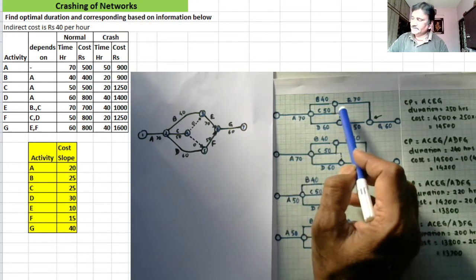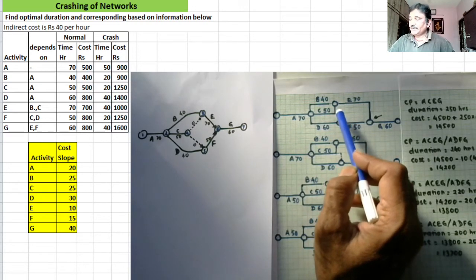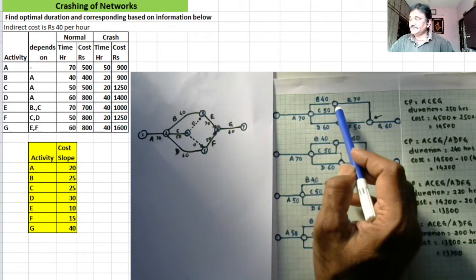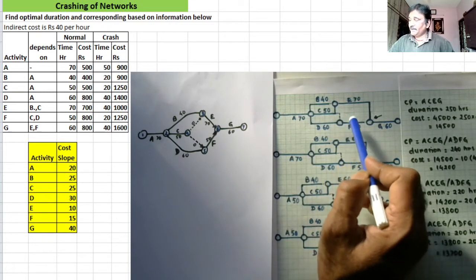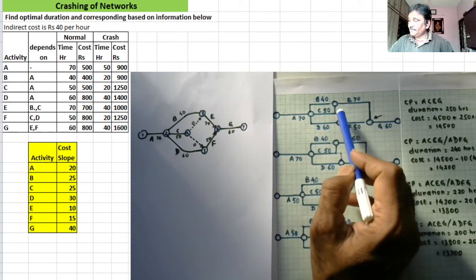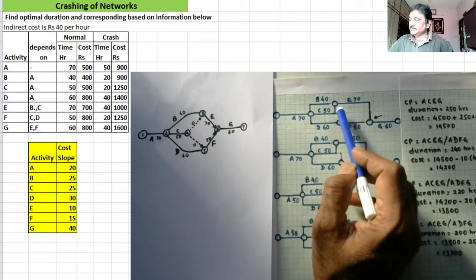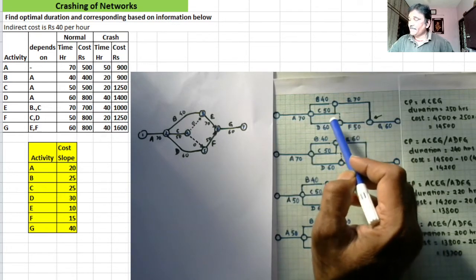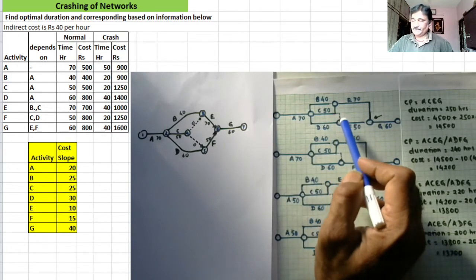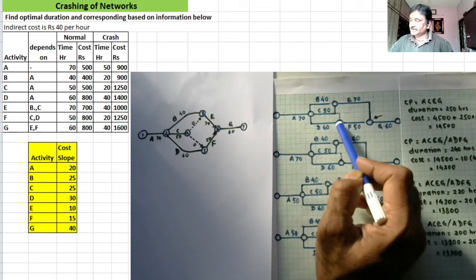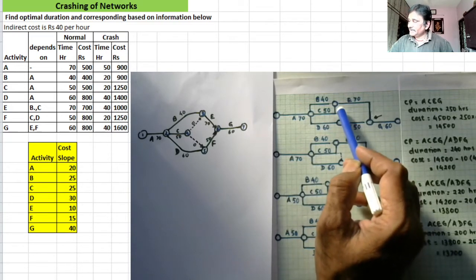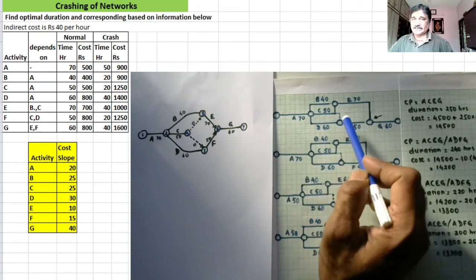That simply represents slack time. Activity C is in fact completed, but for starting activity F, it has to wait for D's completion, and only then will they join at this point. There is again a slack of 10 hours here.